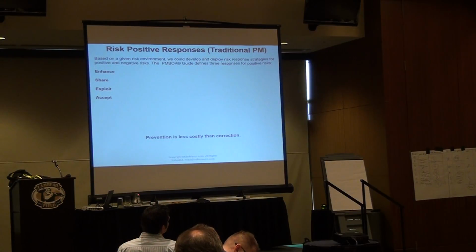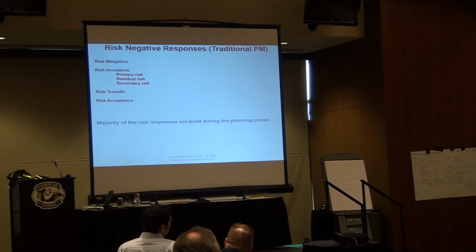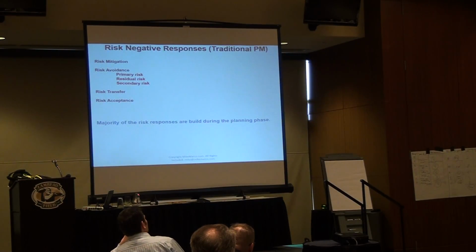now, in terms of risks, we respond on positive and negative risk. Risk response on positive can be enhance, share, exploit, and accept. And then responses on the negative should be, again, avoid, accept, transfer, mitigate. I'm sure you're PMP, so I'm sure you know this concept. What I want to point out here is that risk has 3 levels: primary, secondary, and residual risk. Residual and secondary risk are also known like second and third order risk.